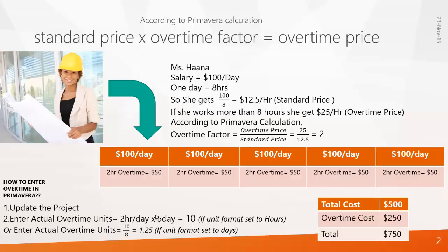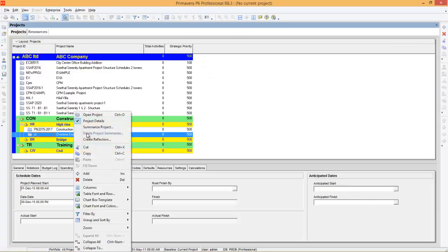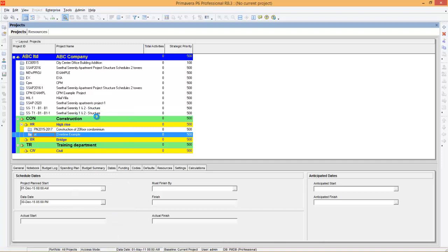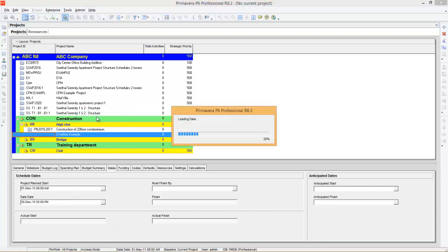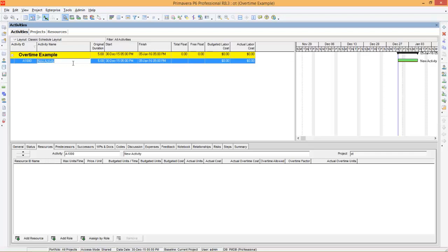So we'll see how to do these things in Primavera. Let's open the software. Here is the project overtime example project. I will open it — right click, open project. You can create an activity and call this activity as drafting, which is a five-day activity.